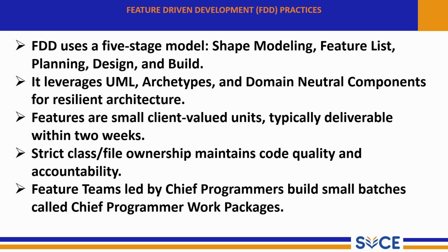Feature list: break the system into small user required features. And next one is the planning: decide which feature will be built and when. And next one is design: create the design for the feature. Build: develop and test the feature. This structured approach makes feature driven development easy to manage in large projects.